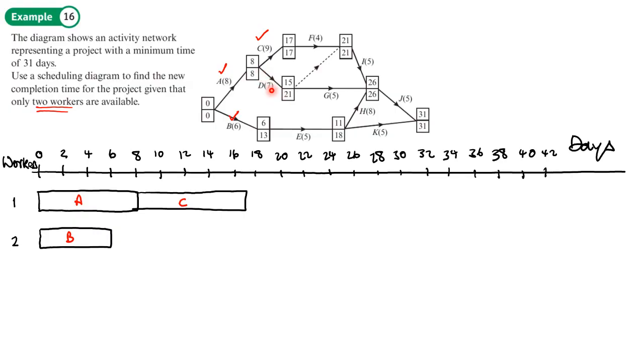We can't put activity D in here because that can't be started until day 8. So we will put in activity E because that can be started straight after activity B. That has a length of 5. Now we can slot in activity D because it's after day 8 and it's got a length of 7, which means it would finish at 18, which is fine because we can finish up to day 21.